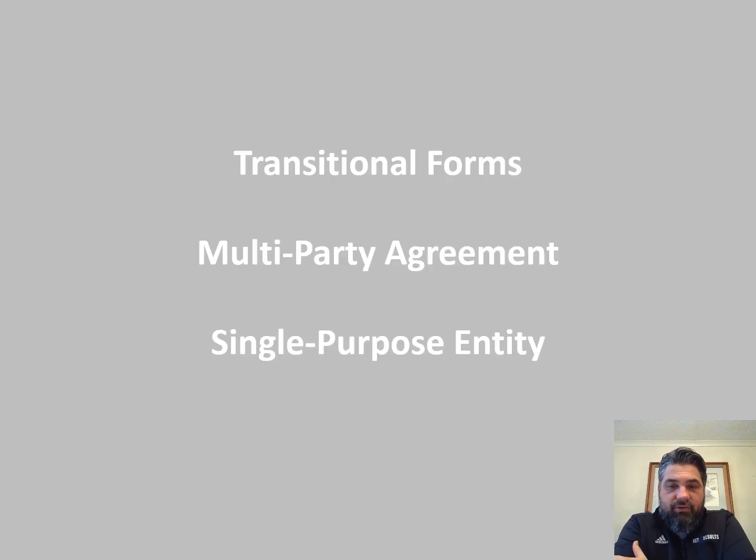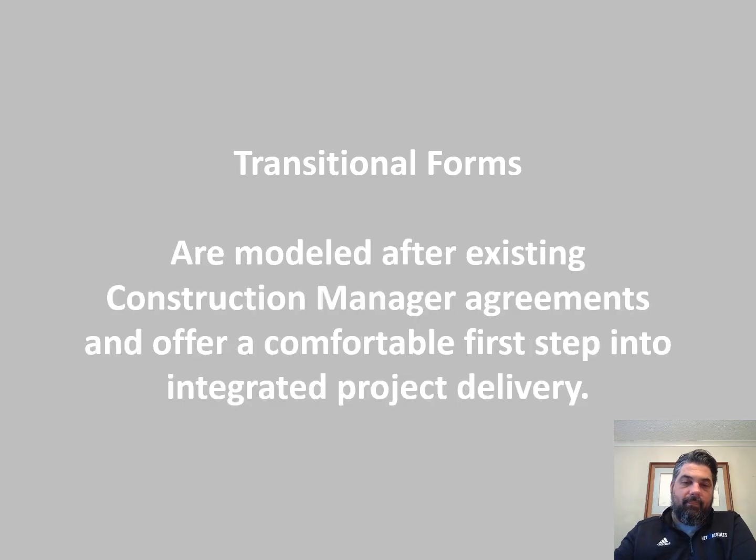The first is transitional forms. The second is multi-party agreements. And the third is single-purpose entity. So transitional forms are modeled after existing construction manager agreements and offer a comfortable first step for integrated project delivery. So it really looks like CMC, or construction manager as constructor.